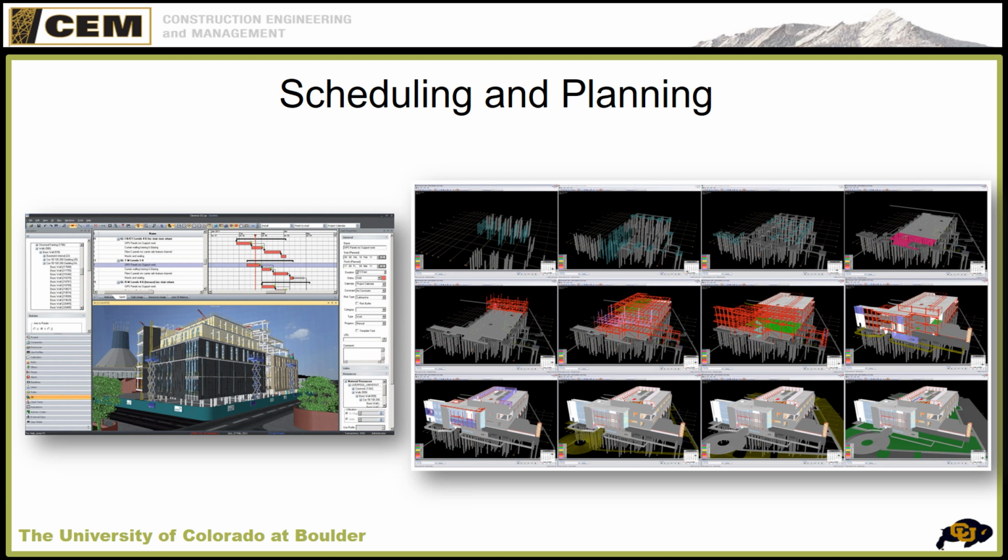It also establishes really clear communication between all the parties, the owner, the general contractor, the subs, the design team. And we usually publish schedules at the very beginning. That's called the baseline schedule. And then we update those through the course of the project, usually monthly.